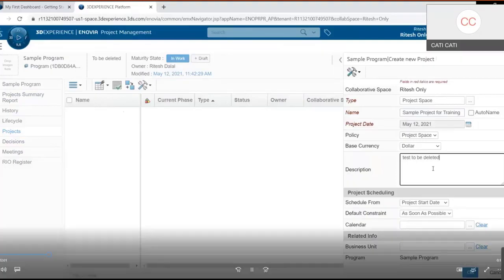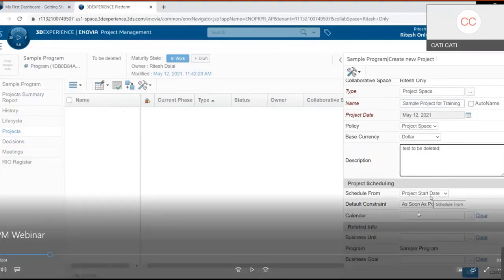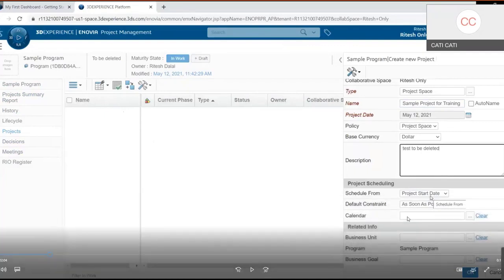Calendar right here, you guys, I'm going to pause it here. There's an option for calendar. That's if you have your own internal calendar. Okay, so if your workplace has their own calendar, maybe some fiscal calendar, right, that's different than your standard calendar, you can enter that calendar into your main system, into the main 3D Experience configuration section, and then that calendar is selectable here. Okay, so the whole project is based off of your internal calendar, not the standard date calendar.